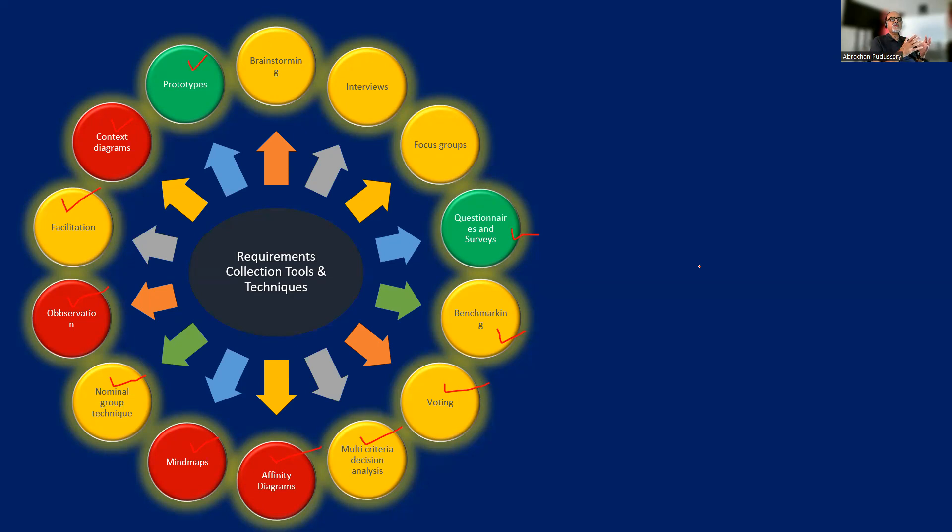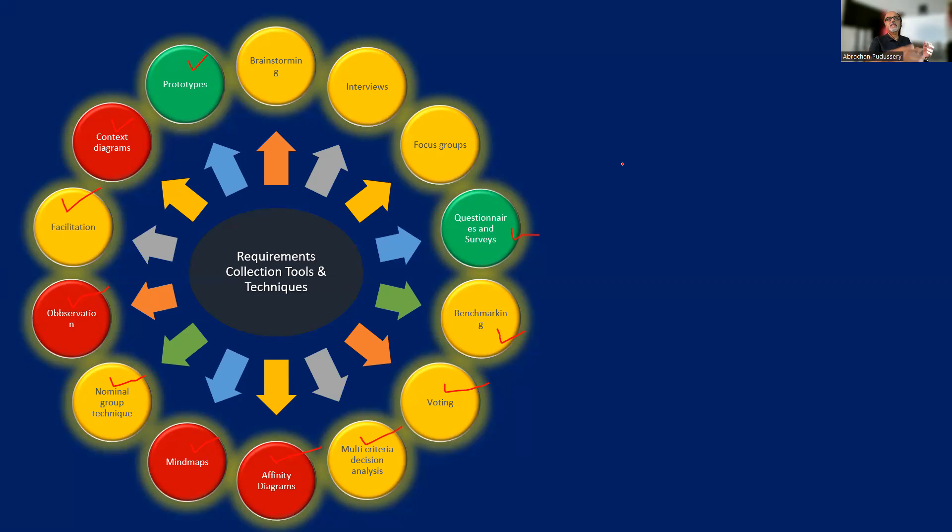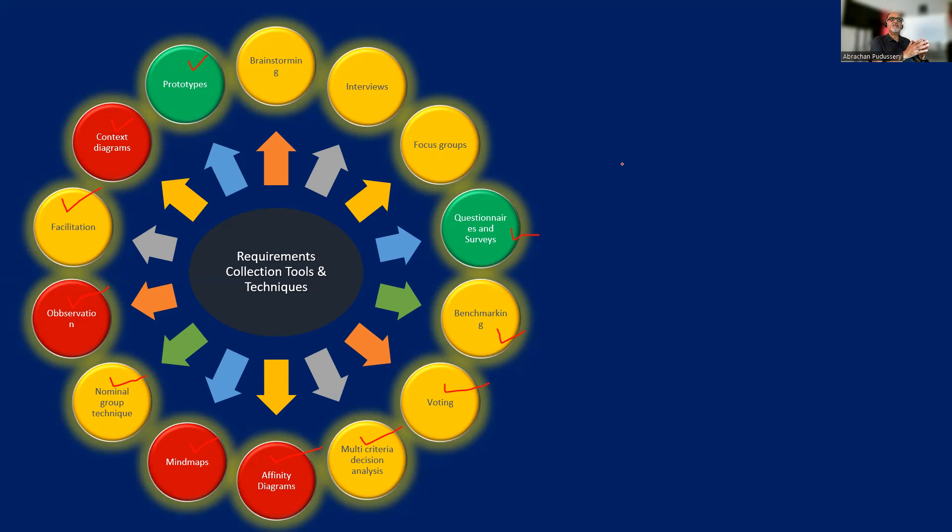A requirements related defect or omission, if you can capture within the requirements phase, the cost factor can be one. If you're capturing during the design phase, the cost is 10x. And if requirements omission is getting unearthed after releasing the system, it can be 100x the cost of repair. So it is very important to capture all the valid requirements during the requirements collection phase itself.